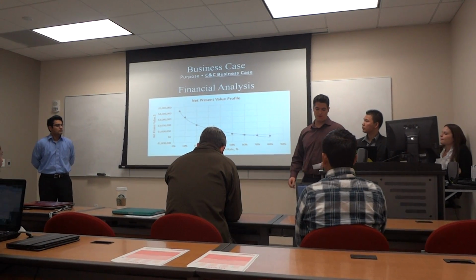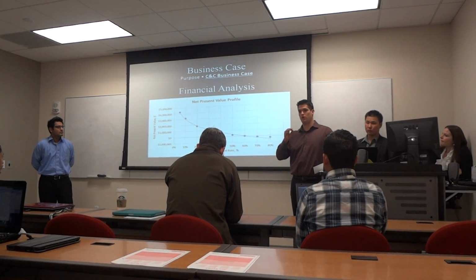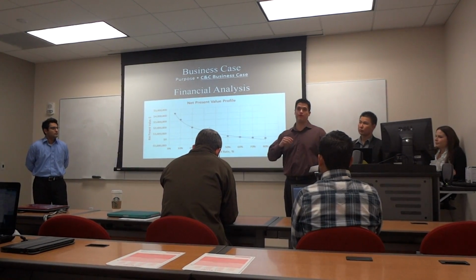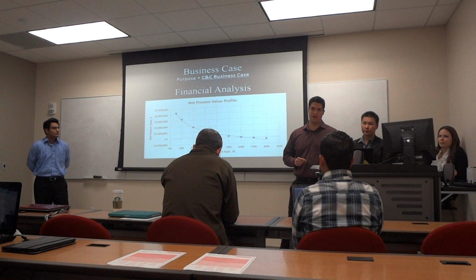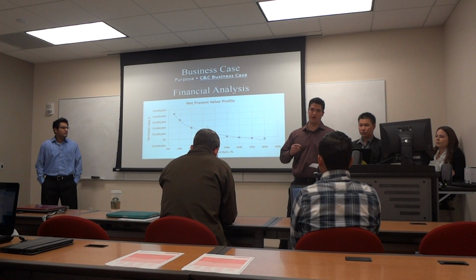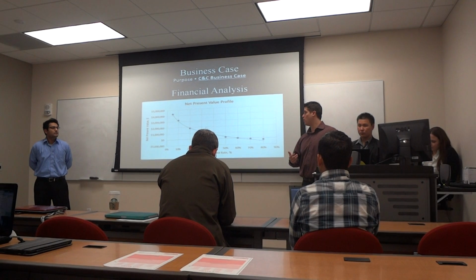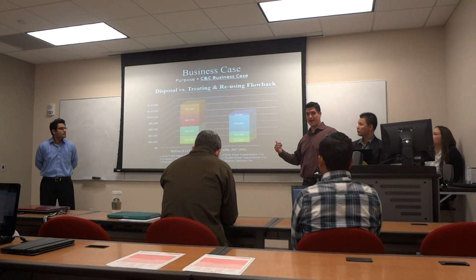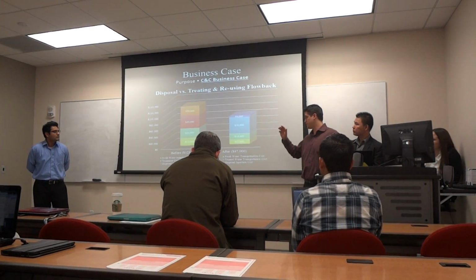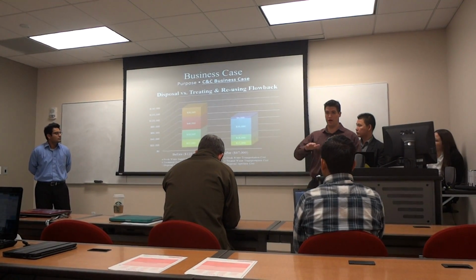As I mentioned before, the financial analysis was executed for the lifetime of one well, from the time the well was drilled until the end of production. We first calculated the free cash flow, from which we then calculated the net present value using a 10% discount rate. We also calculated the internal rate of return, and what we concluded was that treating and reusing flowback in Barnett Shale gas fields is truly cheaper than disposing of it here in Texas.